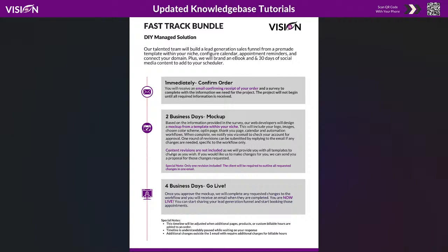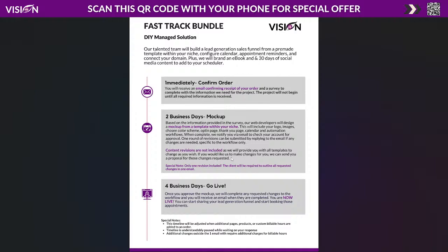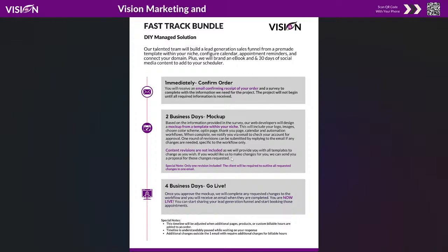Notice here it says content revisions are not included, as we will provide you with all templates to change as you wish. If you would like us to make changes for you, we can send a proposal for the changes requested. Special note: only one revision is included, and the client will be required to outline all requested changes in one email. So again, we are making sure that all of the expectations are set for the client, and also for the freelancer and me as the agency owner. I'm kind of the middleman, and I need to make sure that everyone knows what's going on at all times and that the expectations are clear.